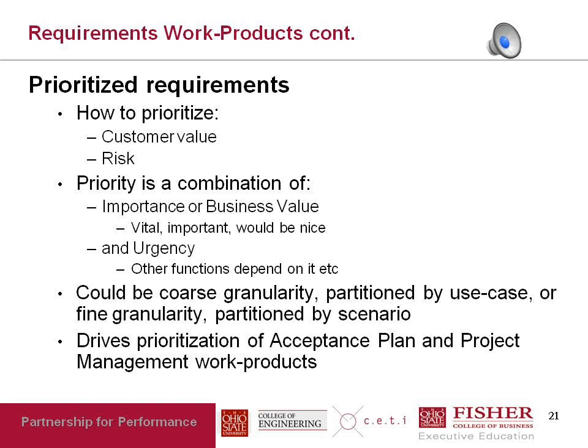And typically the urgency factor comes from whether other pieces of functionality depend upon it. So for example, a login use case or a login scenario doesn't really generate much business value because it's not a transaction that generates revenue. On the other hand, it has high urgency because other functions depend upon the login functionality being available. Now, when you prioritize requirements, you can prioritize them at a coarse granularity by use case and by non-functional requirement, or you could prioritize at a finer granularity, which is by scenario within a use case.